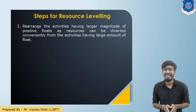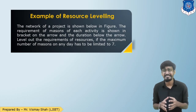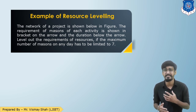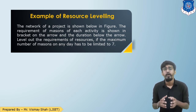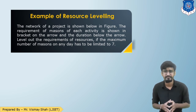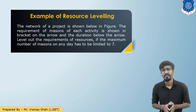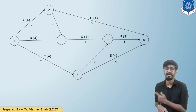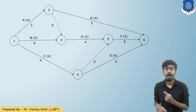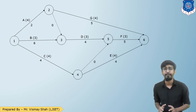Now let us see the example for resource leveling. A network is given in the diagram. In the brackets above the arrow, the mason (resource) requirement has been displayed, and below the arrow the duration has been displayed. We need to level out the resources if the maximum number of masons per day is limited to 7. Here is the network diagram, where above each arrow is the mason requirement and below each arrow is the activity duration.